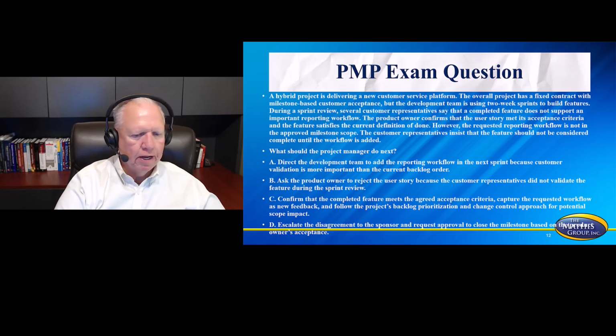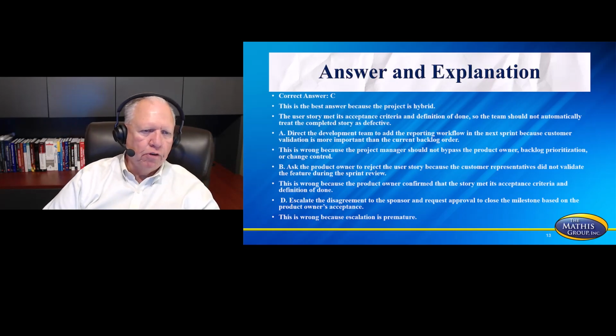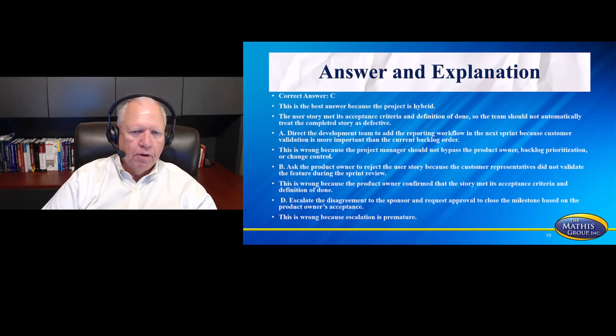All right, let's talk about that answer. So your best answer here was C. This is the best answer because the project is hybrid. And so the user story meets its acceptance criteria and definition of done, so the team should not automatically treat the completed story as defective.